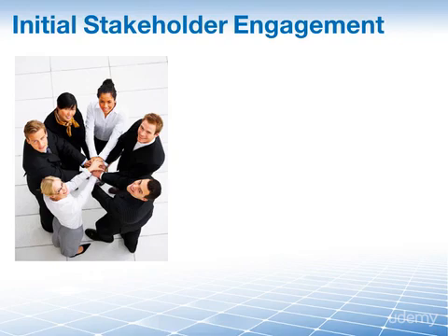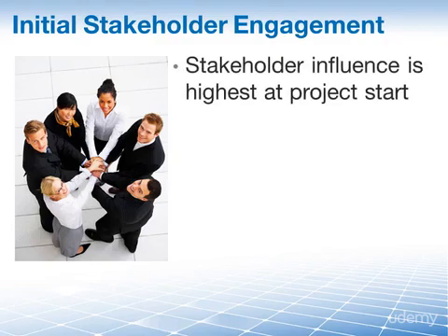This is because the ability of stakeholders to influence the project is usually highest during the initial stages of a project. Therefore, it's extremely important that the engagement of stakeholders occur as soon as possible after the project has been chartered and the project manager, you or I, have been named. This should follow as a logical activity after initially identifying and analyzing the project stakeholders.